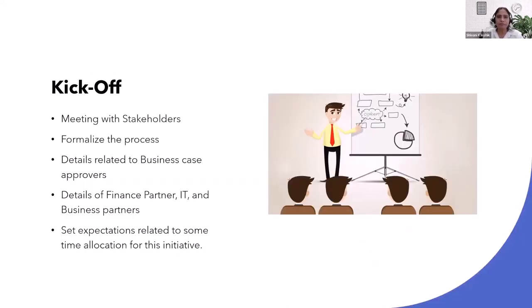Kickoff. This process may vary. Some organizations have a straightforward process. Some may require a lot of background work, but in general, you should align the initiative timeline with the organization's budget timeline, because this would be a new request that the leadership has to add to the fiscal year. So give them enough time to include the request in the budget, meet with the stakeholders, and formalize the process.